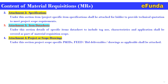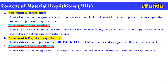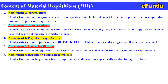Attachment 4 is project or scope drawing. Under this section, project scope-specific P&IDs, FEED, or bid deliverable drawings as applicable shall be attached as part of the material requisition. Attachment 5 is client specification. Under this section, all applicable client specifications, in addition to the project specification, shall be attached for the reader to comply with the client's requirements.